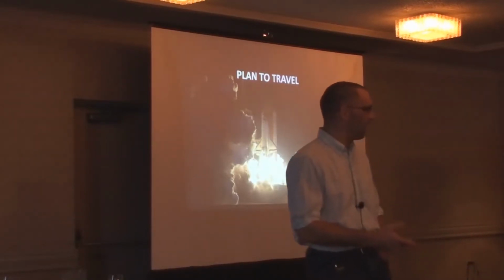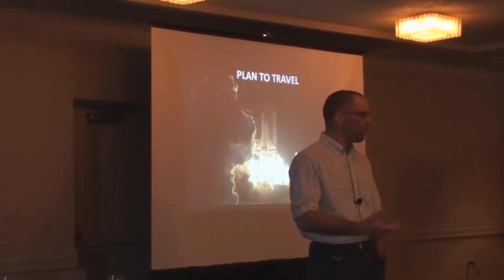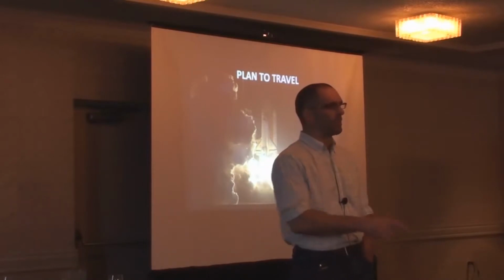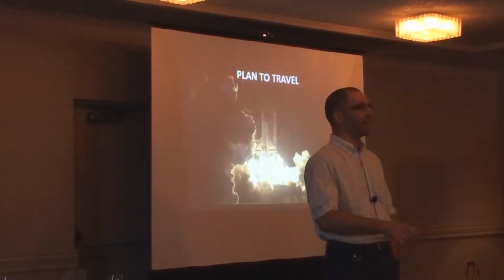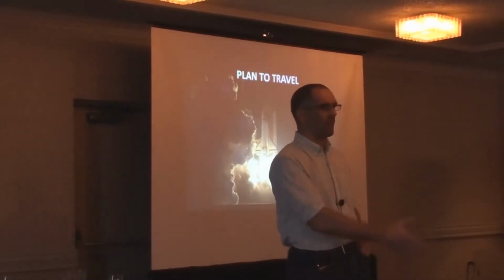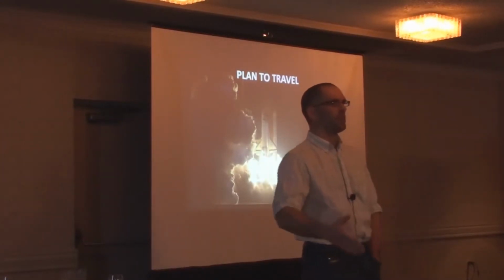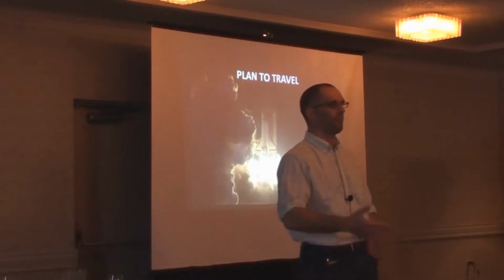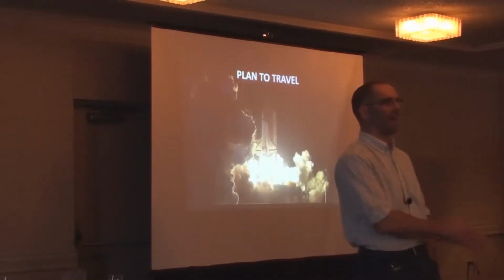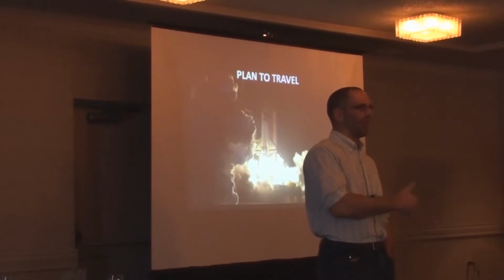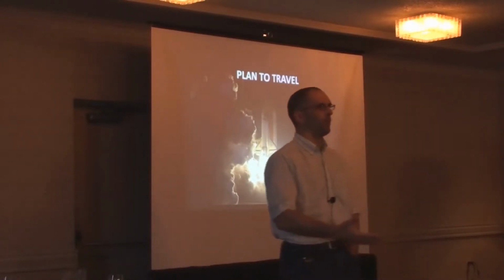And typically the way P&P projects work, because we write a lot of documentation with them, there does tend to be what I call an end game. We try and be done at the end of every iteration, but typically there's that last iteration where you end up having to do a lot of fit and finish wrap-up work, because the reality is we document not only the actual end-user functionality, but also a lot of the source code.